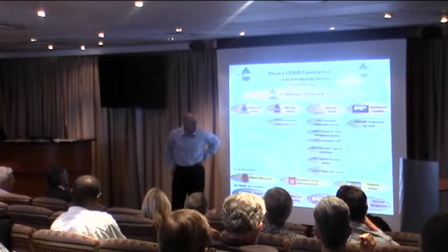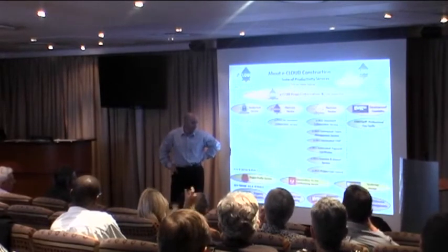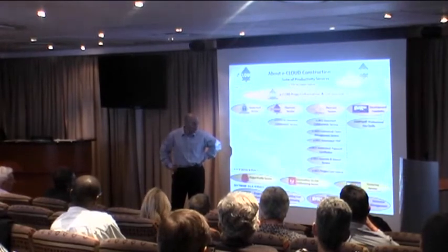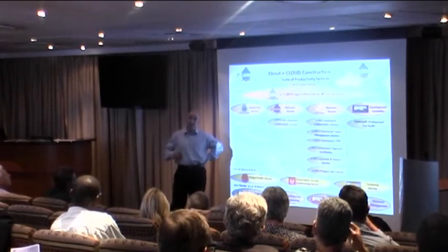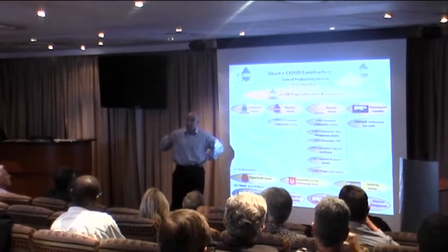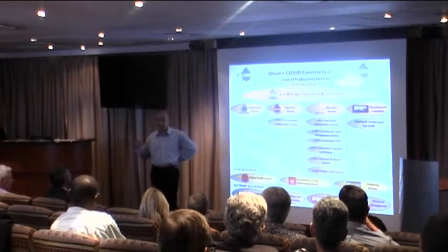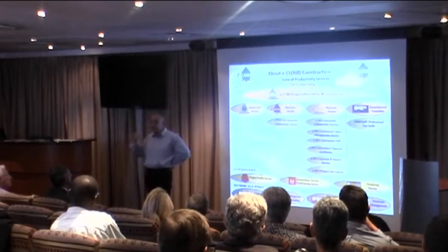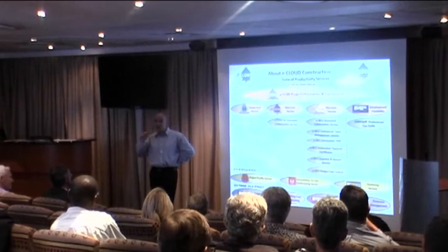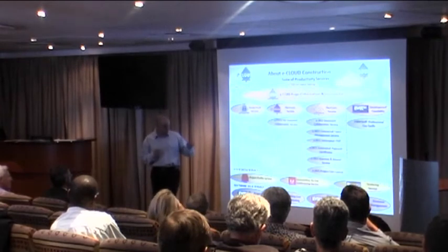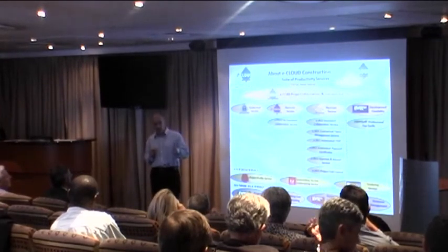And then lastly, project log, which is being rebranded and has now become a web-based timesheet tool. We've used that system in MLC for many, many years. Not only is it capturing timesheets, it's capturing professional fees that are coming in against a project. So they are logging in the fees, the budgeted projection of fees against the project, against the time allocation or the activities of time that have been spent on a project, so that you can determine profitability on a project-by-project basis. So it's web-based time capture against fees coming in on a project.